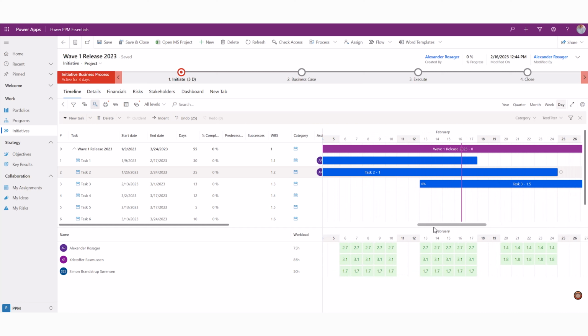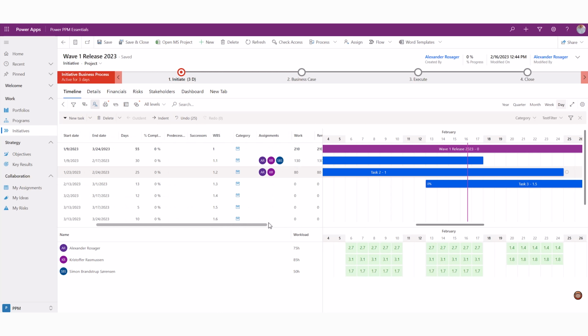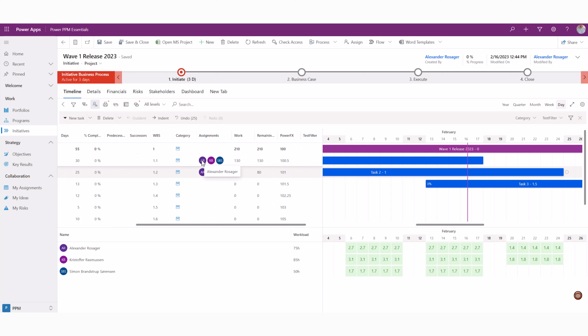The overview of the hours is equal to how the project plan is viewed in terms of the timeline. For planning, switching to week might be preferred. In this demo, I have already added a couple of resources. The hours added for each resource are spread out evenly across the timeline of the tasks it's related to.